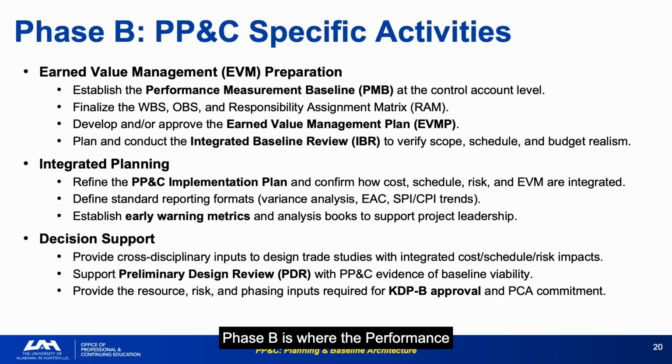Phase B is where the performance measurement baseline, PMB, is established and the Earned Value Management Plan, EVMP, is finalized. This is the EVM infrastructure that will govern Phase C/D reporting. The Integrated Baseline Review, IBR, conducted in Phase B is a joint government-contractor review that validates whether the PMB is realistic and executable. If the IBR is not sound, neither is the KDPB approval.